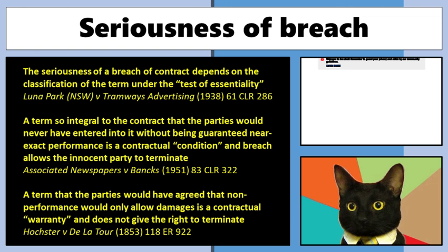So first thing to note, when you hear that term from this point forward, there is a specific technical meaning of that word in contract law. Warranty is a minor term that, if breached, only entitles the innocent side to dollars. And the word condition also has a general purpose meaning, which is usually just to describe terms broadly. These are the conditions that you enter into this arrangement with us. What they mean is these are the terms, which is confusing, but just make note, for the purposes of contract law, that is what these two words mean. Okay, so just for the duration of the subject, or if you're having to deal with your lawyers at some stage.